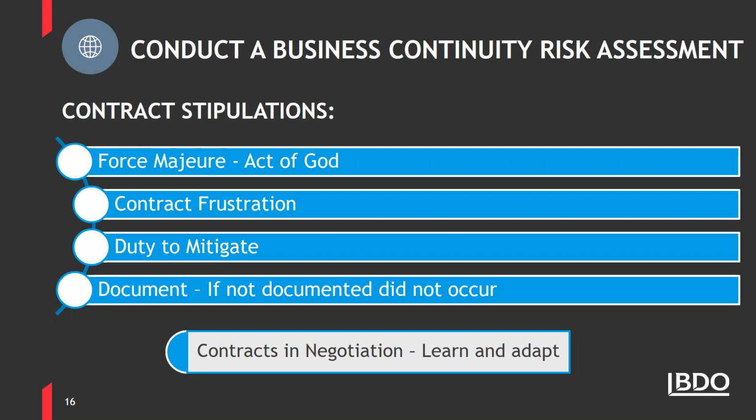One of the things you should know is, like in any other contract, you have a duty to mitigate. Make sure you take appropriate actions to mitigate any delays or damage to the project. Most contracts will require you to have made a reasonable effort to avoid or minimize the impact of COVID-19. For example, if a certain supply of goods is at risk of being cut off in the supply chain, did you consider stockpiling or seeking alternatives? It's trying to make sure the losses are minimized.